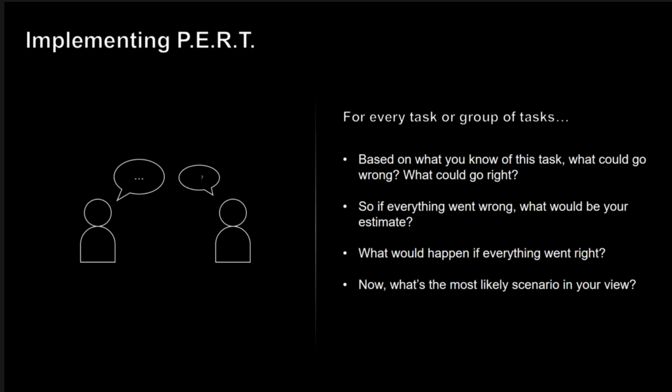Secondly, it is a good practice to ask these questions in order. You don't want to talk about the most likely scenario before talking about the worst case and best case. The two extremes will set the proper tone for your counterpart to calibrate and be more thoughtful when estimating.